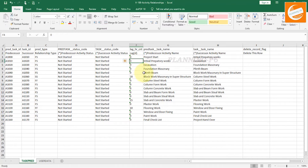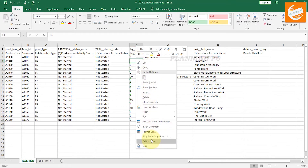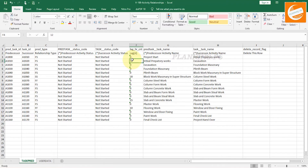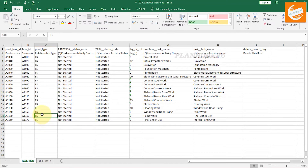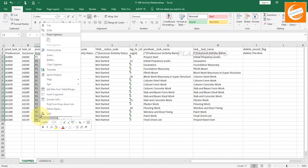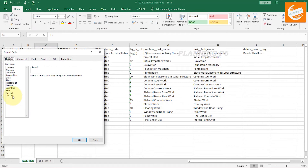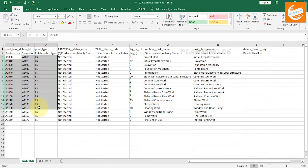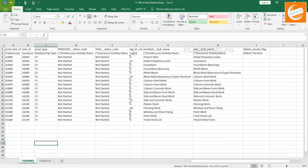We can add a few more lags — say 12 days — and format those. You can select the entire row after making all changes and format everything as Text at once. After finishing all relationship changes, format all cells as Text, then save your file and close it.